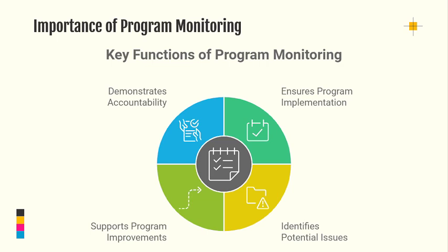The other thing also, it ensures program implementation. So when you have a monitoring system in place, you're going to ensure that your program implementation is followed according to what was planned, right? So if you say we want to train 100 people, with monitoring, you're going to follow up to say, have you trained the people that you said you would train? Right? If you say you're going to hold all these sessions, have you done these sessions? So monitoring will just ask you and ensure that your implementation is up to standard, right?